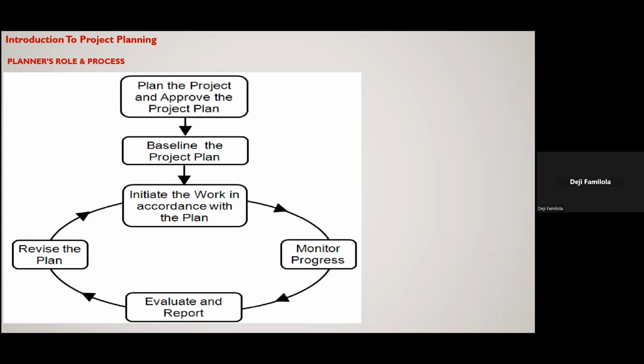Then how do we recover this delay? So you would give them the impact analysis, the cause of the delay, how these actually happen, what happened. You tell them the stories using your plan. Then they will ask you, can you give us a scenario plan as well, how we can recover these? Then you give it to them.